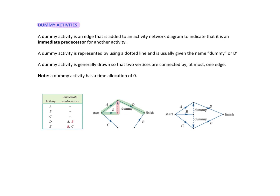To explain: activity A led into D. But B is also a predecessor to D. I can't connect B's line to A's line because it would look the same as activity A but it's not. So we put a dummy line to show that B also has to be completed before D can happen — they are separate activities.